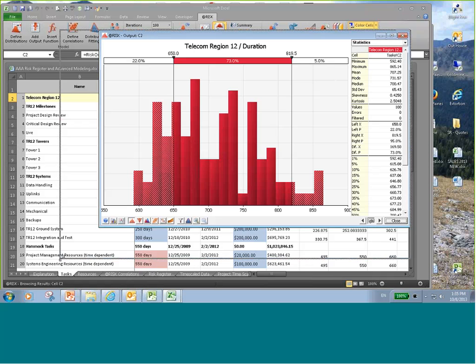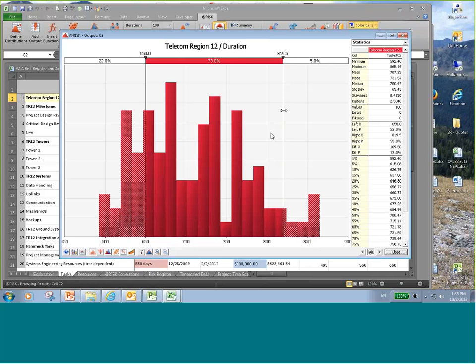So if you're looking at the P95 value or the P90 value, depending on which side you like to look at, this shows you the P95 value, that 95% of the time this project will finish in 819 days and a half or less. Or I can go to the, actually I'll do it this way, you can just type in the number and the delimiter moves for you. P90 number is 787.8 days or less. There's a 90% chance it'll happen, 10% chance it'll be 787 or above.